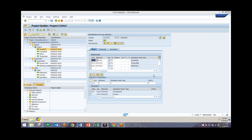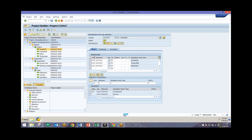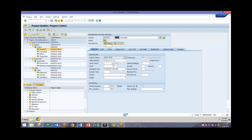Once you have these relationships set, you want to input the durations for each of these activities. We'll take a look at the overview for this particular activity and enter in a duration. For this one we're saying we want this to take two days to complete. We also have the crankshaft at two days, piston at ten days, and timing belt at five days. We'll see on the Gantt chart what that looks like in terms of an overall layout.